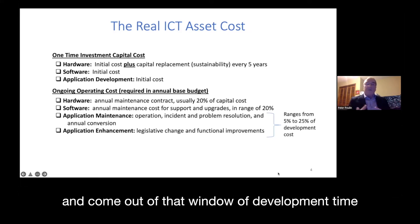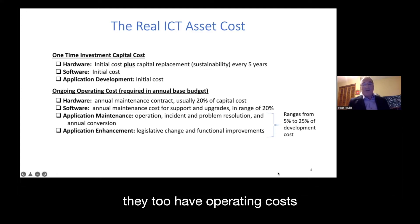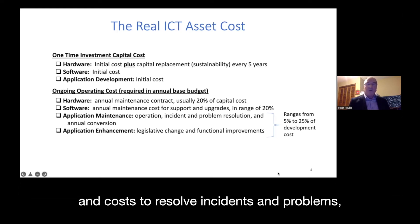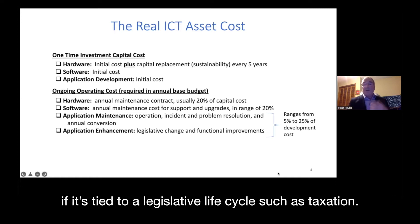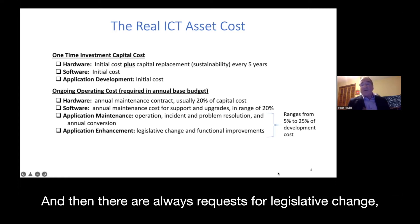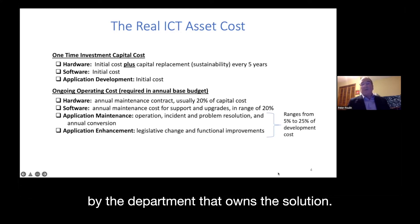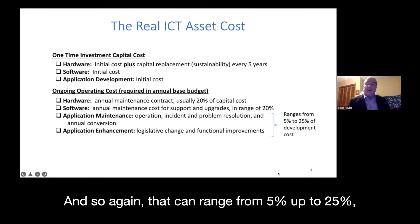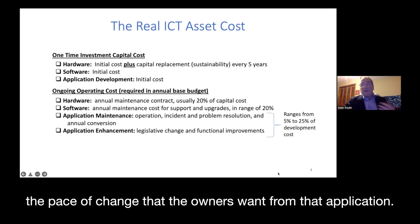Applications themselves, once implemented into production and past the development window covered by the initial capital budget, also have operating costs — costs to resolve incidents and problems, annual conversion of the application if it's tied to a legislative life cycle such as taxation, plus requests for legislative change and functionality improvement. These costs range from 5% up to 25% of the application investment, depending on the pace of change the owners want.